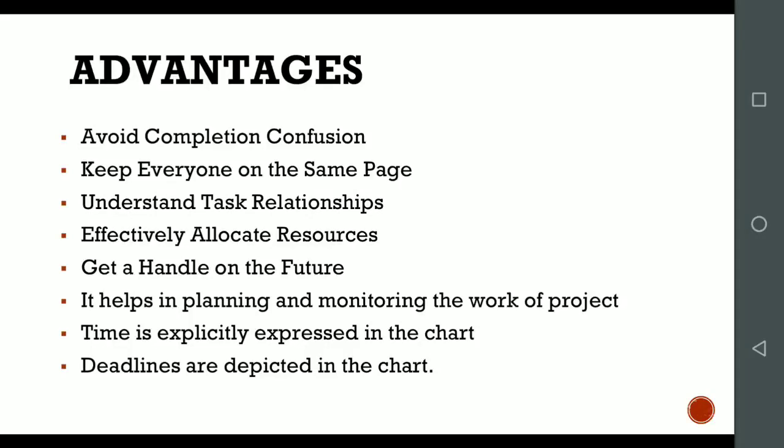Next is effectively allocating the resources, meaning which tasks require how much time. To reduce that time we can allocate more money and more manpower there. More men and more money can be put in so that the duration can be reduced, and if some tasks require less time, we can shift this manpower from there to the other tasks.